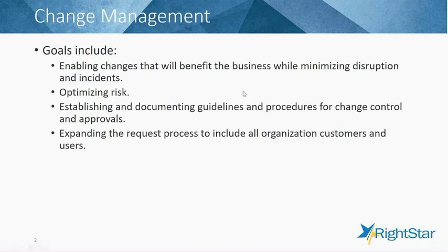Another big component of change management is the need for approval. So we want to be sure that people are responsible for the changes that they're making, that more people within the organization are either being consulted or informed. We set up workflows for approvals to make sure that all of the important stakeholders are being consulted, that they're having a chance to provide their assessment or approval, which can make this a little bit cumbersome. So there are certain things that we do to automate this process.